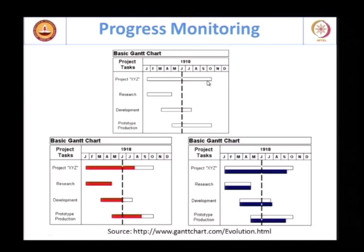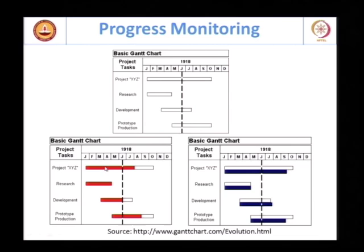Another very convenient aspect of a bar chart is that you can use it for progress monitoring. You have the regular bar chart which is the plan, and as progress is made you can start shading the bar to show where you are — on a particular time period, how much progress has been made. You can shade in the bar or show a parallel bar to see how much is completed. It becomes tricky to define what we mean by progress, and we will take up that question more when we cover the project monitoring module.